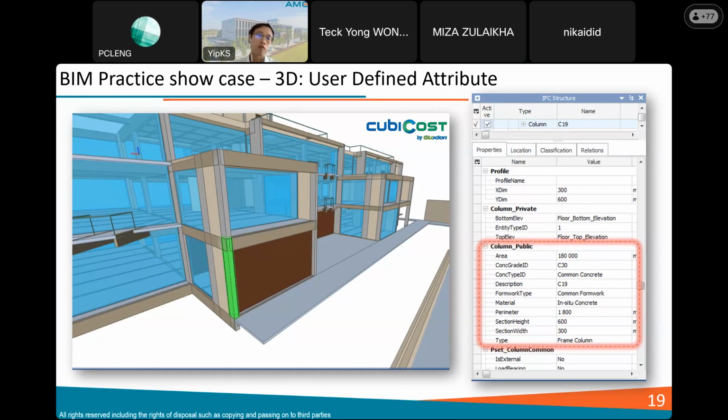SketchUp, for me, is a LOD 100 kind of 3D BIM. When you evolve to LOD 300, one of the differences is you increase the detailing on the geometry, but most importantly the information, the attributes contained in one geometry, is getting more and more comprehensive and complete. So even in 6D, green building, you can insert the carbon emissions attributes in every concrete element, and in 7D facility management, you can insert the operations manual attached to every element.